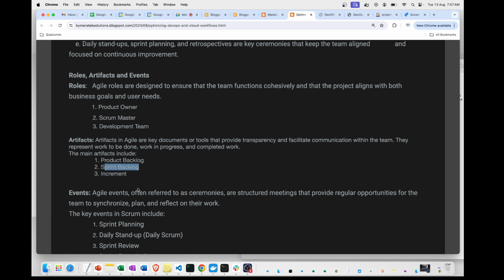User stories will have points, which we call time duration. This time duration is a bit controversial. Some people take 1 hour as 01, and 1 day as 01 again. That is a bit controversial, but it is very specific to the project. The Scrum master will decide that based on how many points.